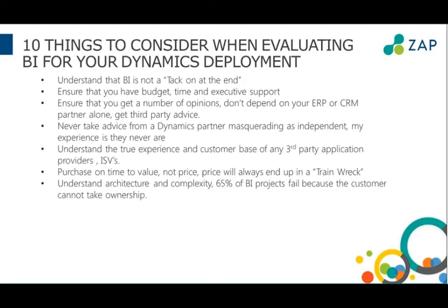And, understand also that whatever you're investing in is complex. So the architecture of Dynamics is complex. The architecture of bringing data sources together is complex. The architecture of then getting all the relationships of all that data up to a presentation layer where you can have a dashboard with drill-throughs that give you high-level information for your C-level and drill-throughs for your management team and below is complex. And that's why 65 to 70% of BI projects fail, which is actually now a higher number than ERP projects, if you could believe that.